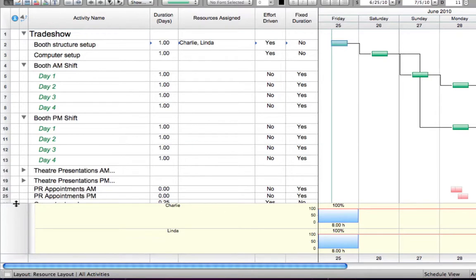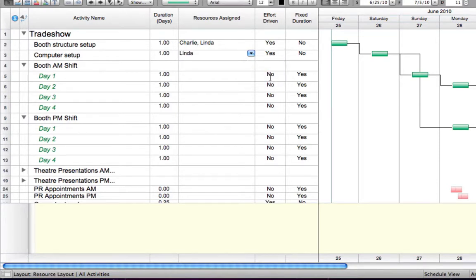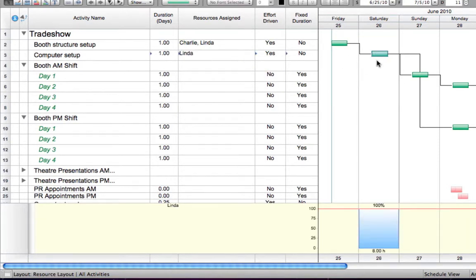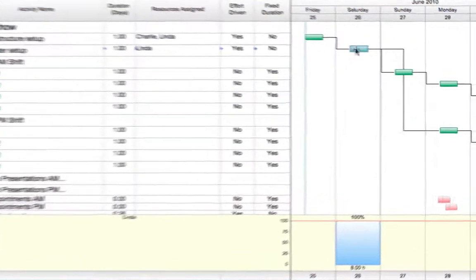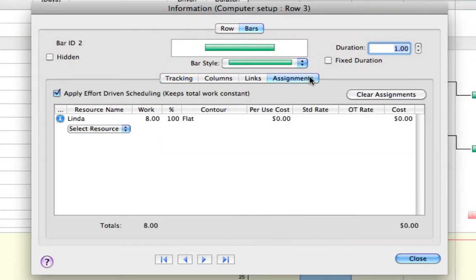By the same token, if a resource's effort is lessened, the task duration will lengthen while keeping the total work constant. Cutting the resource's effort by half will double the length of time it takes to complete the task.